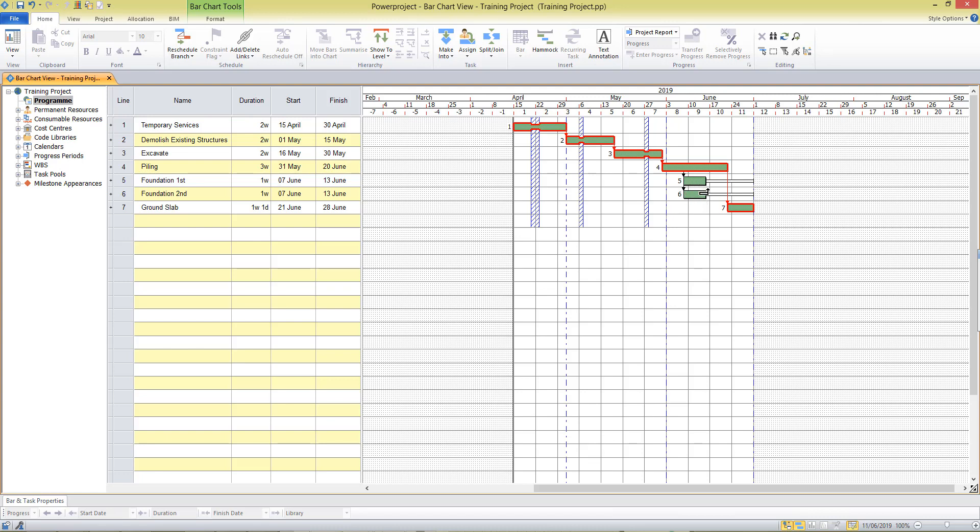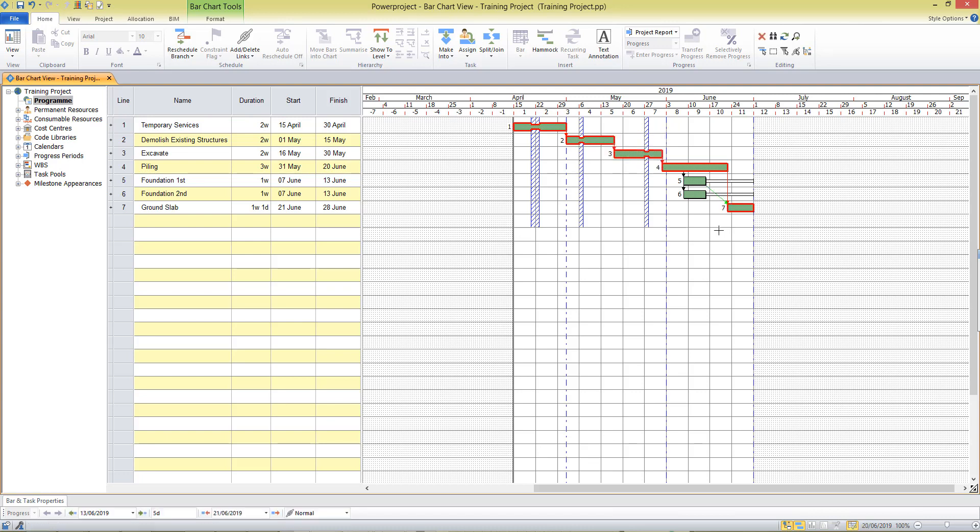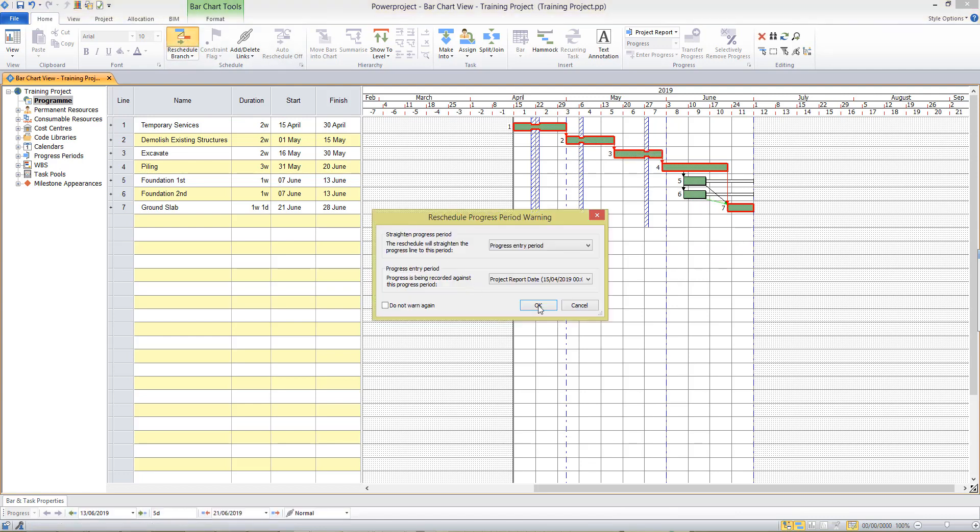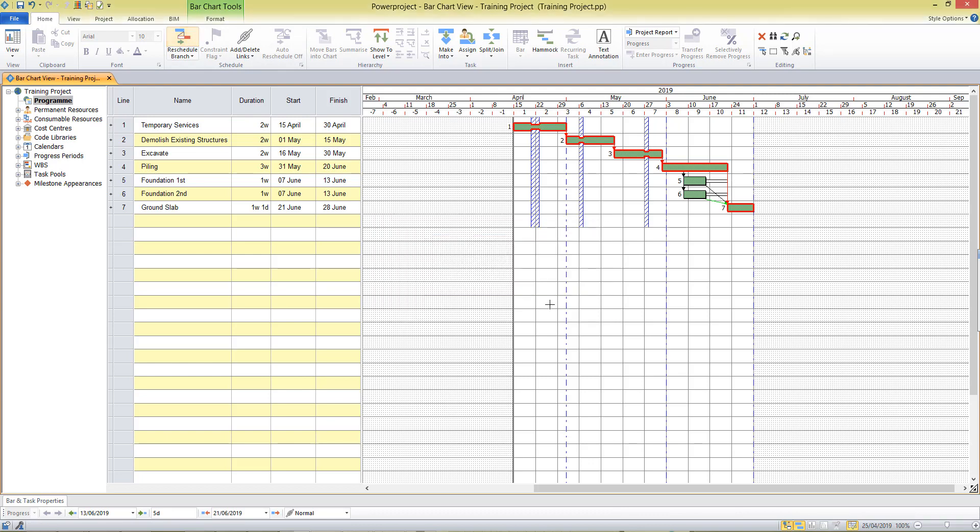So if I just tie up the ends of these tasks I want to show that the foundations do have a relationship to the ground slab and we couldn't start that activity unless we completed the foundations. When I reschedule you see the float period has been reduced there.